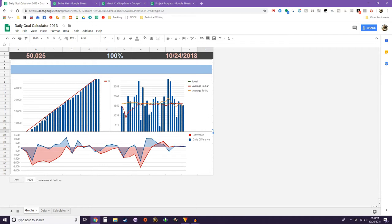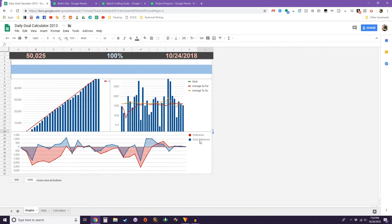This particular year I started off on a slump, caught up, got behind, caught up again, got behind and then finished. This graph shows how many words I wrote each day in absolute terms. The red line is my average words written so far, which equalizes toward the end. The yellow line is the average I need to write per day going forward in order to finish on time — it gets more erratic as you go because you're dividing by a smaller number. The green line is just the 1,667-words-per-day target.